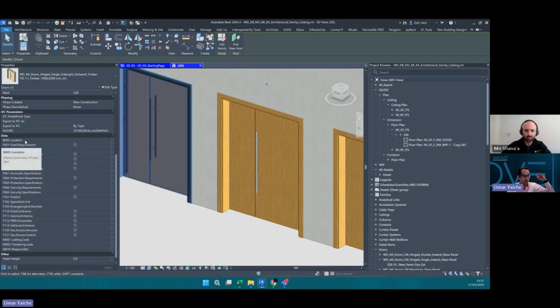I'm going in my matrix from top to bottom, and the information is filled according to the level of information needed. For example, when I am in LOD 300, I will find this part already implemented. When I reach an as-built model, all of this must be filled, and it will be filled from top to bottom in a logical way.